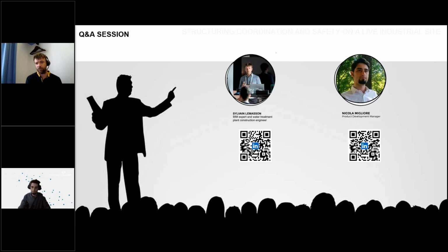We generally just have an organization to update it for Dalux when it was a peak of activities during the studies, twice a week. On Vcad, it was upon their request when we had some consistency checking, which was planned. On doing the site, of course, the updates of the 3D models on the PNIDs are not so fun. So we also organize just the frequency, we adapt according to the studies.